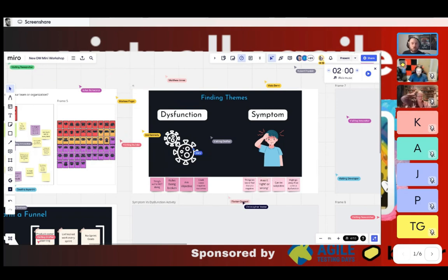So there's no perfect right or wrong. I want to make clear that different people could definitely discuss or argue which thing is a dysfunction versus which thing is a symptom. But this is just about hypothesizing and saying, well, we think this dysfunction might cause this symptom. The reason this is useful for that first step of figuring out what to go after is because usually you'll find that you can identify a single dysfunction that might be the cause of many symptoms. For example, we don't set a sprint goal might be one of the reasons that we are overworked, that we struggle to get things done, that the team feels overwhelmed. The fact that we can connect all those things, at least as a hypothesis, gives us something we can go after that will be really impactful. It'll affect multiple symptoms.